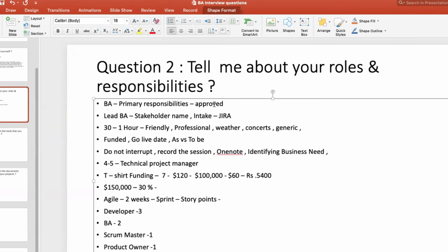Your developers have other projects and their current sprint stories and everything. So on the very first call, you identify all this, then you estimate your LOE, which is level of effort. You estimate that, then you submit that money amount, whatever it is. Once you get approval from your manager, you submit that to your primary stakeholder. That LOE needs to be approved first for you to schedule the other calls going forward.